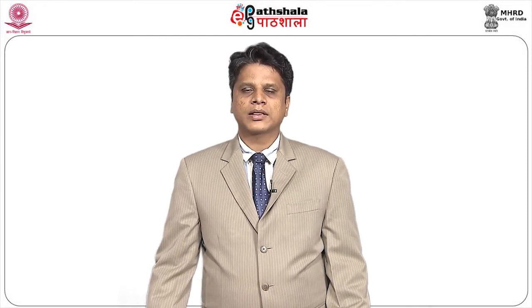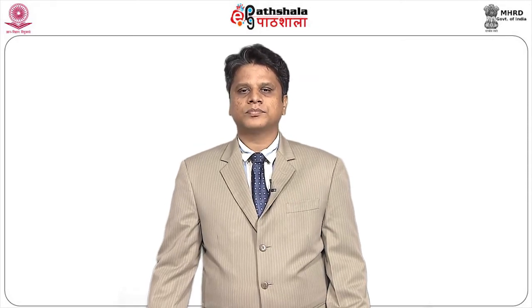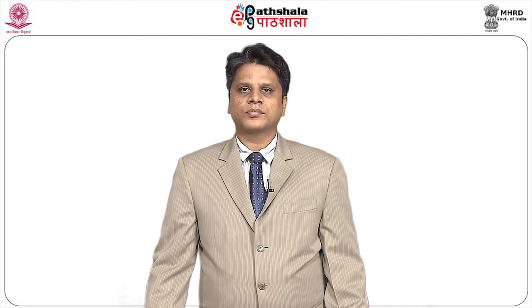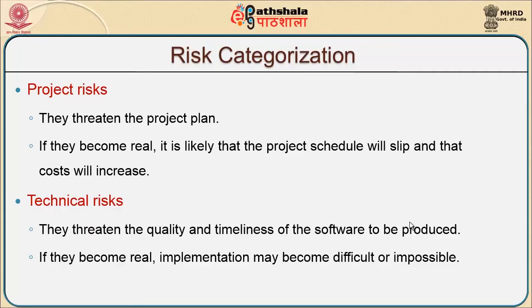The second category of risk is technical risk. Because of this technicality, it affects the quality and the timeline of the software to be produced. The threatening effect will be on two parameters: quality and timeliness. If we want to develop the software, the parameters we look for are quality and the deadlines associated with the project. Because of these technical risks, these two are mostly affected, and implementation may become difficult — sometimes impossible to deliver.